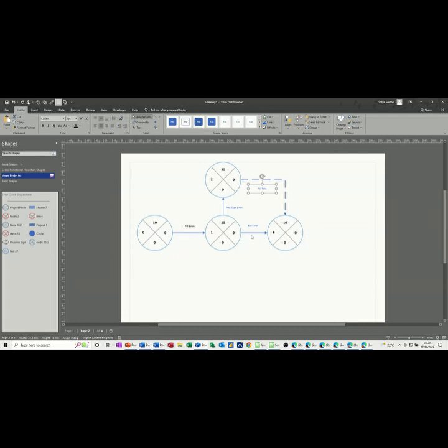Back to this one. So the next one, so we're boiling it. Now we need to pour the water. So we can't pour the water until we've done this. So this is why that's like that. So bring another node on, connect it up, and then the text box says pour water, and pour is just 1 minute, pour 1 min, so that's 6, and then this needs to be 7, so you add that up, 7, and that's the next one, so that's 30, this is 40, number in 40, and this will be 50.